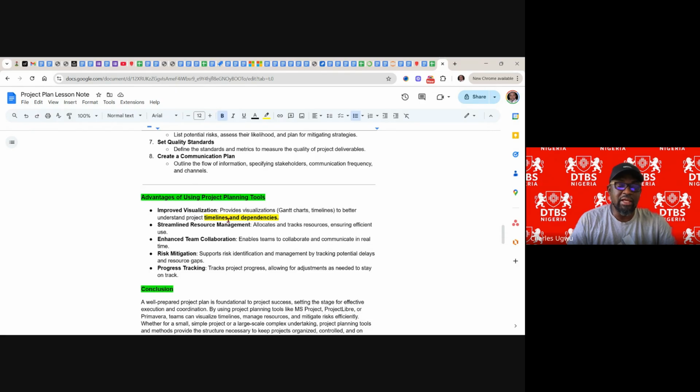Once they are delaying any activity, that delay is going to start affecting the dependent activity. If activity B is depending on activity A, and activity A is delayed, he has already delayed activity B. And other dependencies. So you see the knock-on effect of any single delay. So it's important.